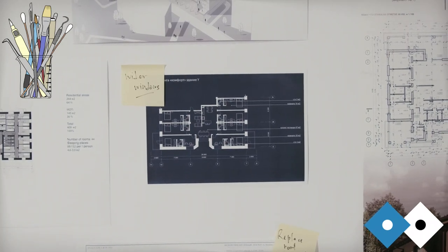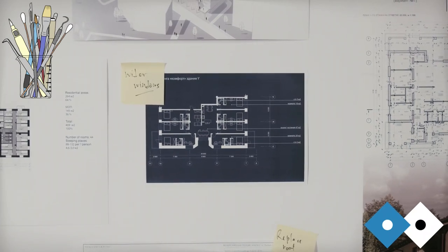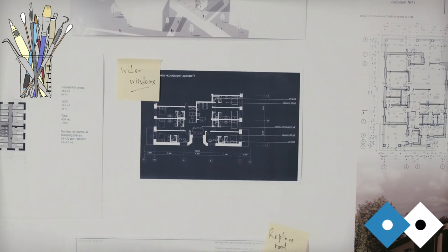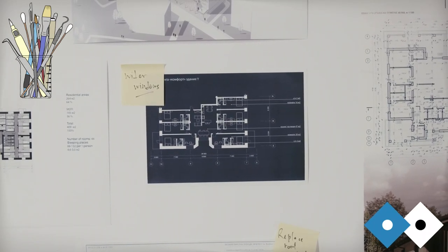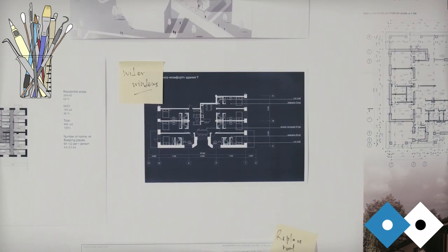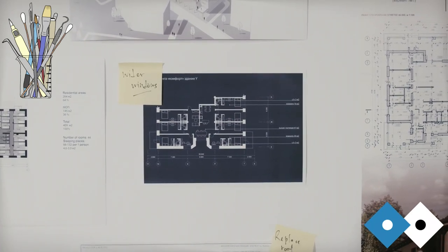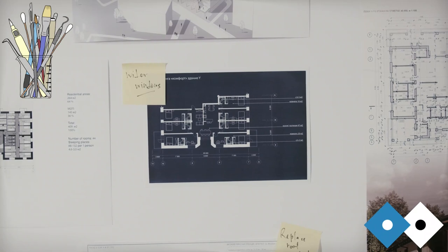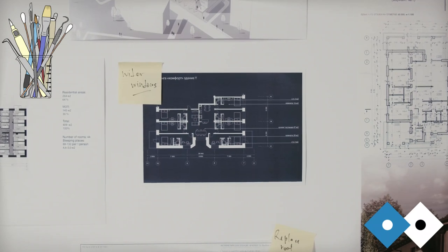The gallery will be handed over to us by the builder on the 31st of January. Then the design team are coming in to build the set in February, and then the various conservators who've been working on stuff for me are coming in towards the end of that month to install their mounted costumes and various other kinds of things. Notably Zenzi Tinker. And then me and my team are going to be installing the rest of the exhibits in the display spaces in the month of March, and then we open for Easter, soft opening. That is the pedal to the metal plan.